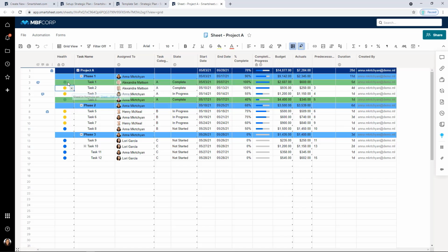You'll notice that in row 3 here, I do actually have a formula that was included with the template set that we downloaded. This formula is going to actually look at some of that information, so the date and the status, and automate the color of my row. Now, instead of having this formula in the cell and be something that can be overridden if somebody comes into my sheet and simply manually changes the color, I can right-click on the cell and convert to a column formula.